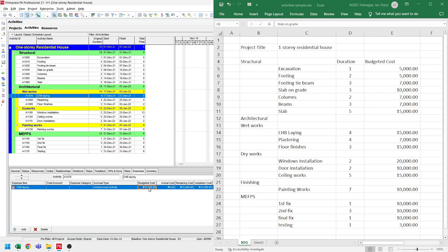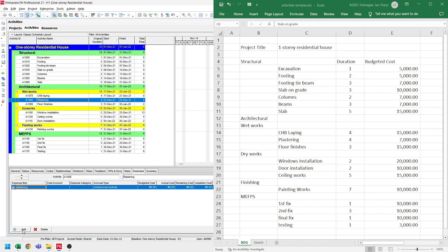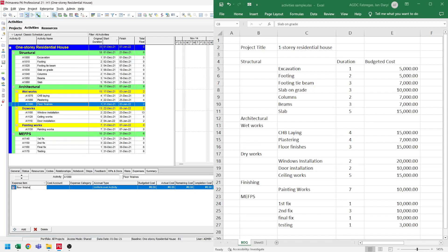Now for the plastering, let's select the plastering activity. On the expense tab, let's click add. Let's rename this to 'plastering'. Let's refer to the BOQ for the cost, which is $7,000, and we set the budgeted cost to $7,000. Now for the floor finishes, let's select the floor finishes. Let's add an expense item. Floor finishes cost $15,000 from our BOQ, so we set the budgeted cost to $15,000.